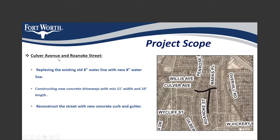On Culver Avenue and Roanoke Street, we are replacing the existing old 8-inch waterline with a new 8-inch waterline. After that, we are constructing new concrete driveways with 10-foot width and 10-foot length. The street will also get new pavement with new concrete curb and gutter.